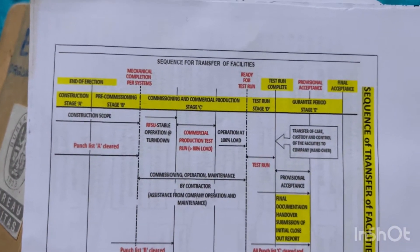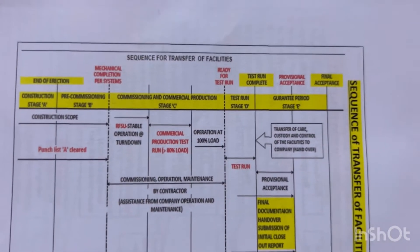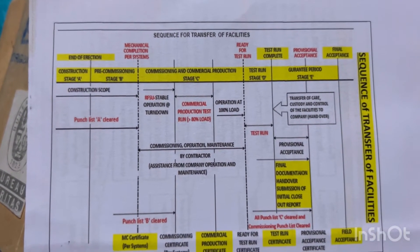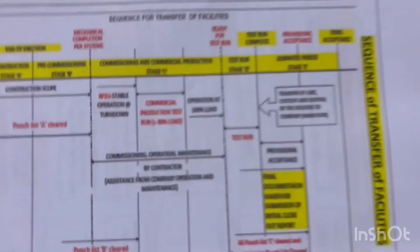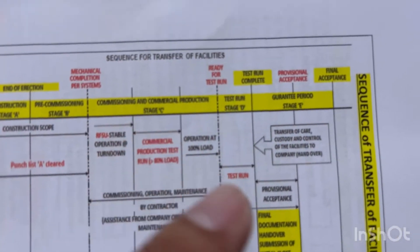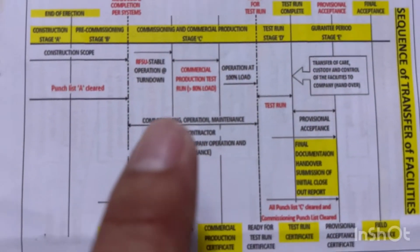I also have here an inspection test plan and sequence of work. That's why I know these things — since my background is from engineering, construction, then inspections. If engineers from the construction side show me the drawings, I know what the issue with the drawing is because of my background. I have been working for 8 years in detail design. And this is your sequence of work from construction, pre-commissioning, then commissioning — and then that's the time we have to give a punchlist with category A, B, C — all of this information.